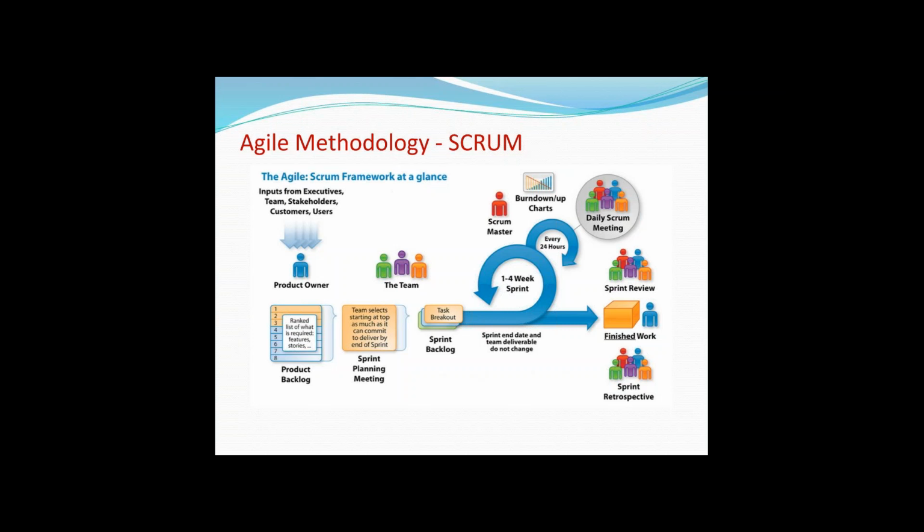So 5 developers will pick user stories. Sometimes each user story will have certain numbers associated with it. Like Fibonacci series like 1, 3, 5, 7, 13, 20, 40, 100, infinity, like that some numbers will be defined. So all these numbers will be defined based on the capacity and based on the complexity of the user story, which means like these things you will get or you will understand in real time. So let us assume that whatever requirement is there, or from now onwards I will not call it as a requirement, rather I will call it as a user story.